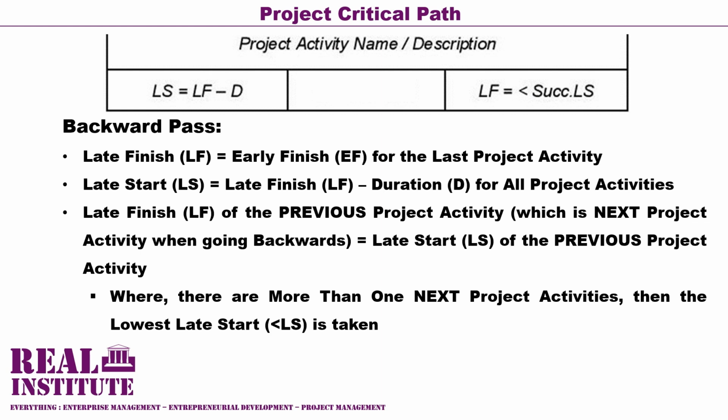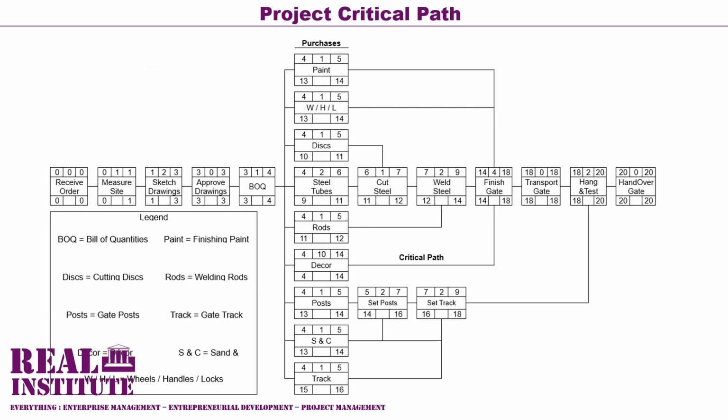You'd also recall that we said late start refers to the latest time that a project activity can start, so it does not increase the overall project duration. This is calculated by subtracting the project activity duration value from the project late finish value within individual project activities.